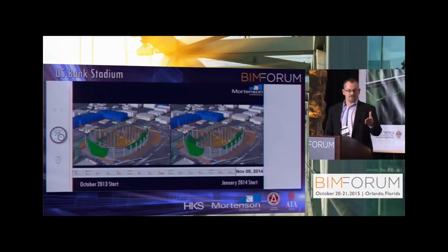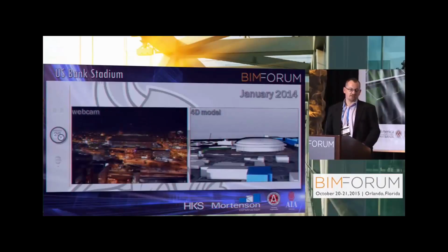And we analyzed it, created 2 variances of the schedule, created two different 4D models to support it. And as you can see, we explained through that exercise that in 2014, around November, both schedules, the start in October and the start in January, will actually converge, and we're going to be ultimately able to deliver the stadium for the 2016-2017 season. What that means to our customer is that they were able to use the facility for a few more months, having a few more venues, revenue continue to be added to the project, right?